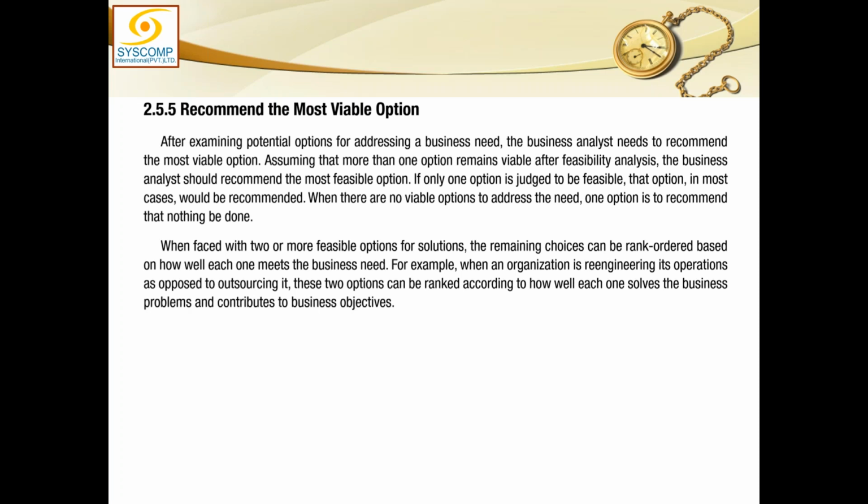So as I said, if there is more than one feasible option, then probably the best will be chosen. If there is only one feasible option, that will definitely be the recommendation. And if there is no option which has been proven to be feasible, then your recommendation would be that no action should be taken.